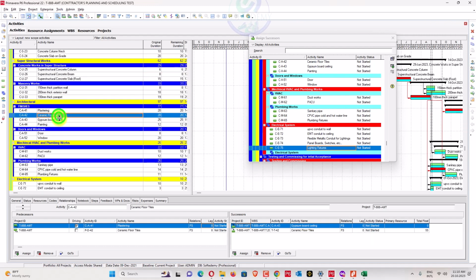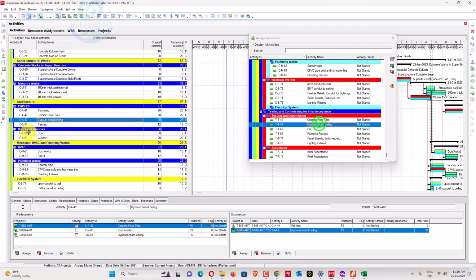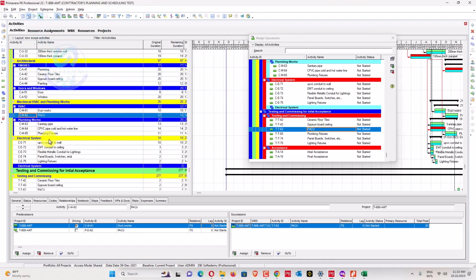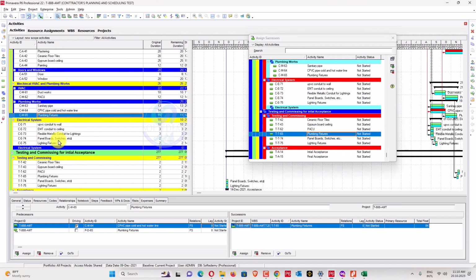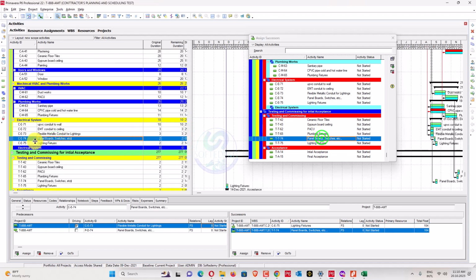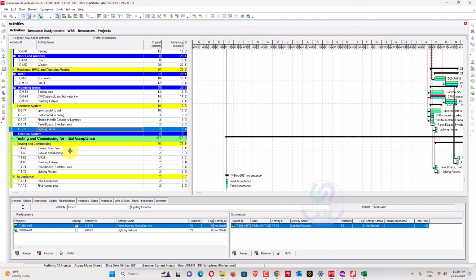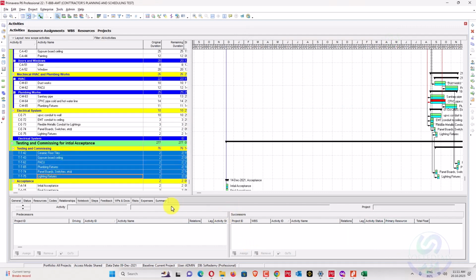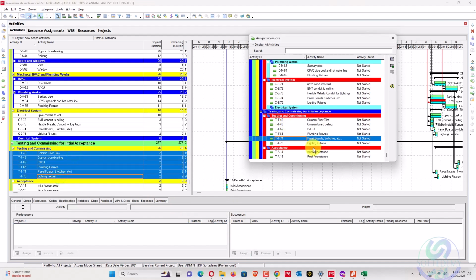Ceramic tiles we have already fixed for the last activity. Okay, so gypsum board, go for the commissioning for gypsum board here, PACU installation of AC, and the last one with plumbing fixture completion, plumbing fixture, and the next one is panel board. So to create that one path, light fixture. So after doing all that work, we will perform our initial acceptance, and select this one, assign, and initial acceptance can be performed after that one.